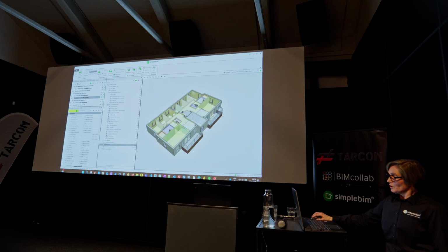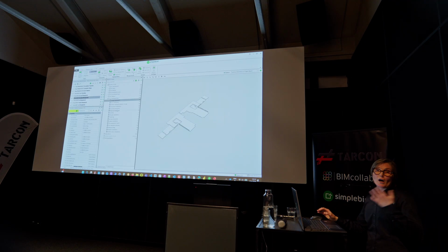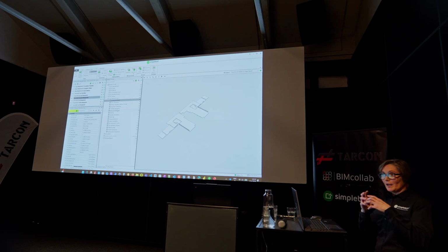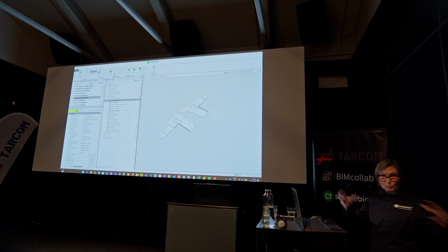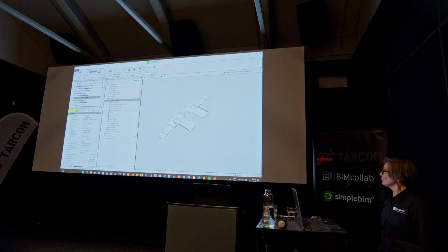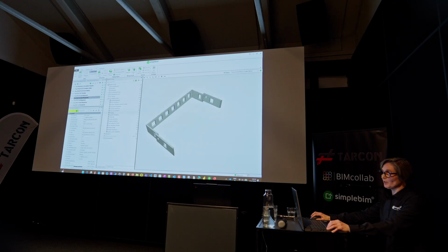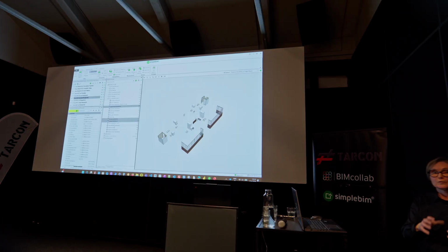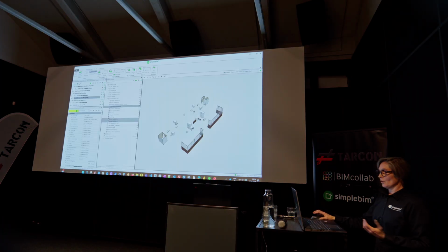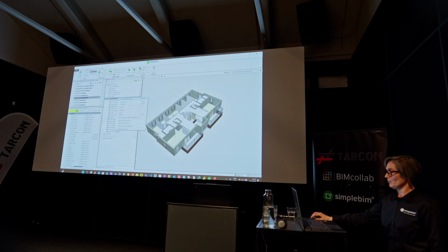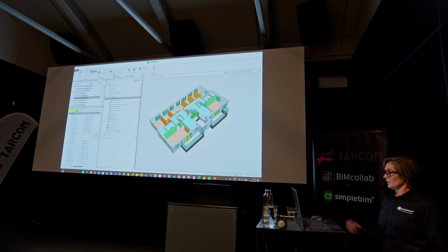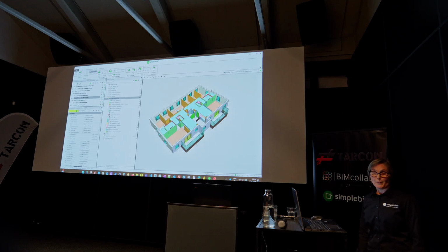I also wanted to organize the model based on installation tasks, because from my perspective, I want to divide the model based on who is installing what and where, and that can be anything. But the tasks themselves can be standardized. So now the model looks a little bit different because it's from their needs.